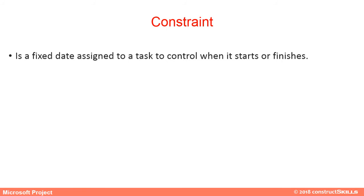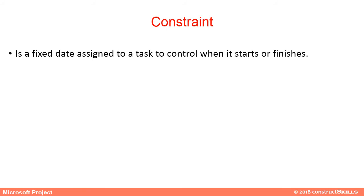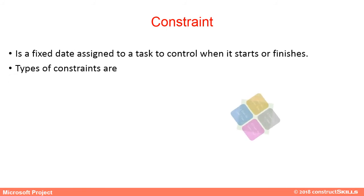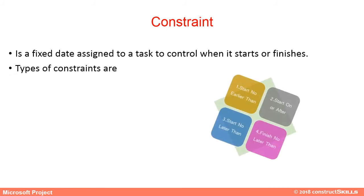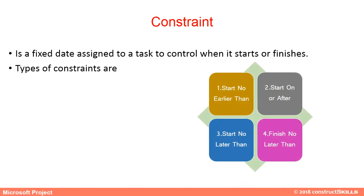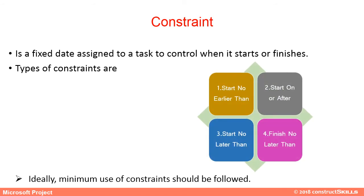A constraint is a fixed date assigned to a task to control when it starts or finishes. There are multiple types of constraints. Ideally, minimal use of constraints should be followed.